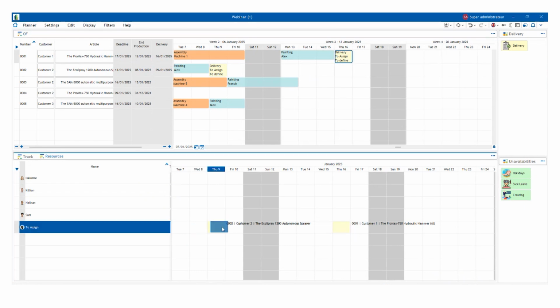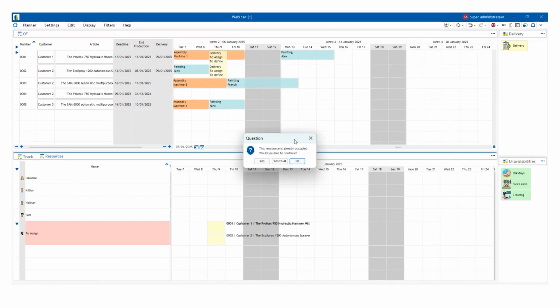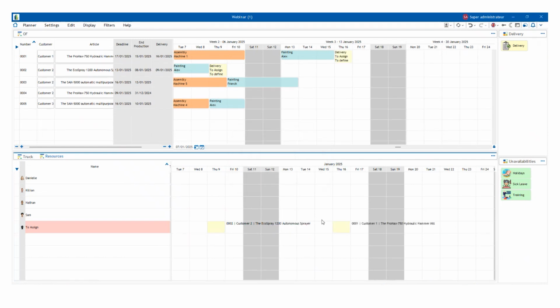Let's come back again to that pop-up alert. With Visual Planning, you will be able to have constraints that will show you scheduling conflicts. So here, for example, I have a scheduling conflict because I have assigned twice to the same employee the same task. And this will help the schedulers to visually see also which resources are available or not.